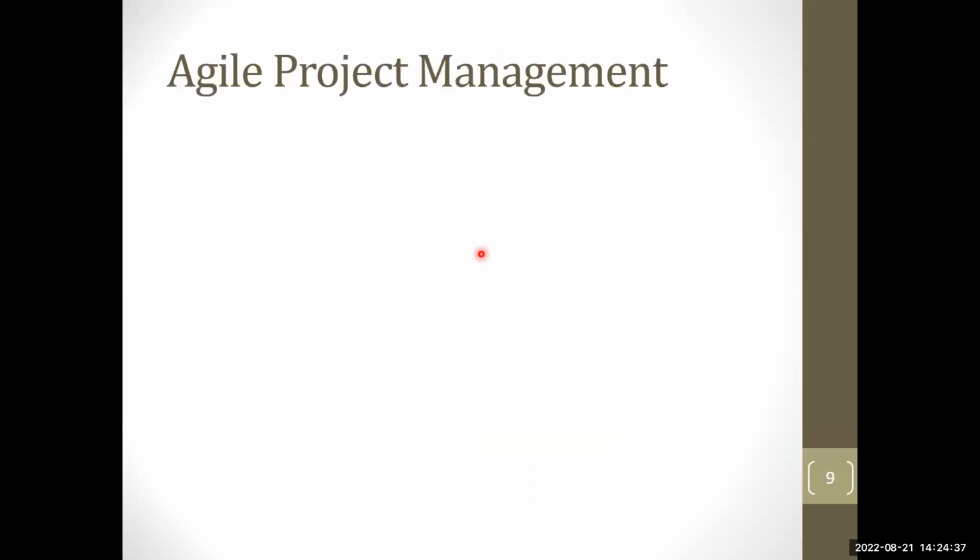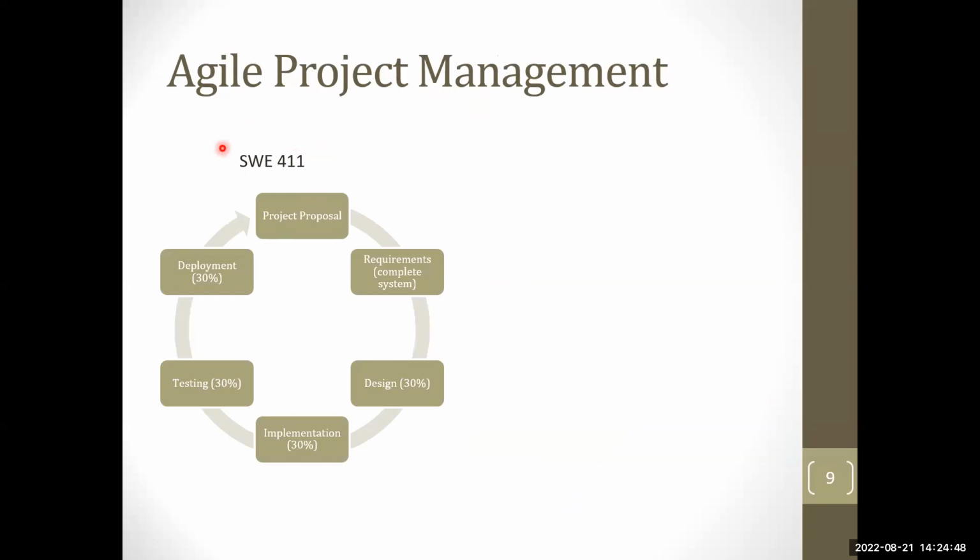And then there is another approach which we have been using for the last maybe 6 to 7 years, which is more like an agile-based approach. And I personally use this one as well. In the first semester, we focus on the project proposals, complete requirements and features of the system. However, then we encourage them to design only 30% of the product, implement that 30%, test it, and deploy it.